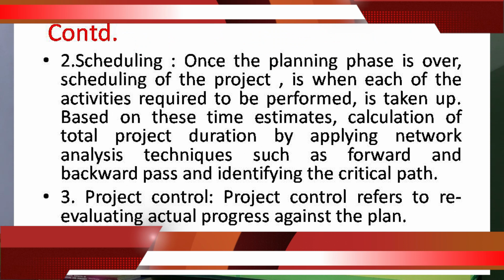Scheduling. Once the planning phase is over, scheduling of the project is done, where each of the activities required to be performed is taken up. Based on these time estimates, we calculate the total project duration by applying network analysis techniques such as forward and backward pass, and identify the critical path. Project control. Project control refers to re-evaluating actual progress against the plan.